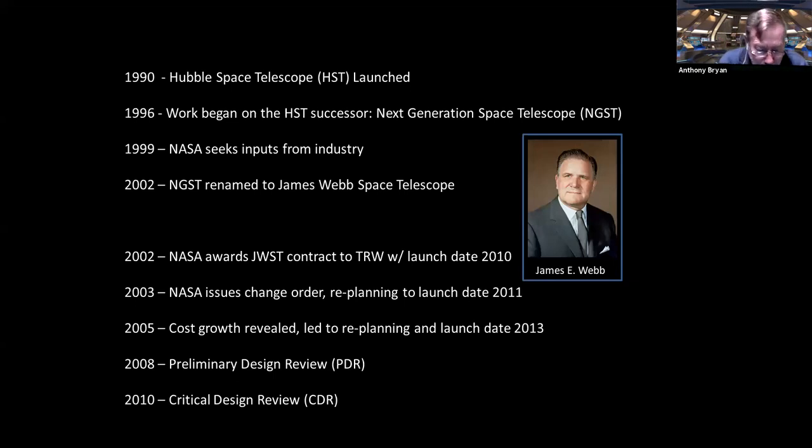So NASA Goddard Space Flight Center is managing the development of the effort, and the Space Telescope Science Institute will operate Webb after the launch. The prime contractor is Northrop Grumman, and obviously anybody that's followed the project has learned it had numerous delays, major redesigns, and cost overruns. Because of these, you may have heard the project referred to as the telescope that ate astronomy. So you must be aware, though, that NASA receives the last portion of funding from the government. So military priorities and other constraints force NASA to work around the money they receive. Some years they're well-funded, and some years their funding falls way short of projections, or they actually get reductions in the funding that they already had. So they have to work around that.